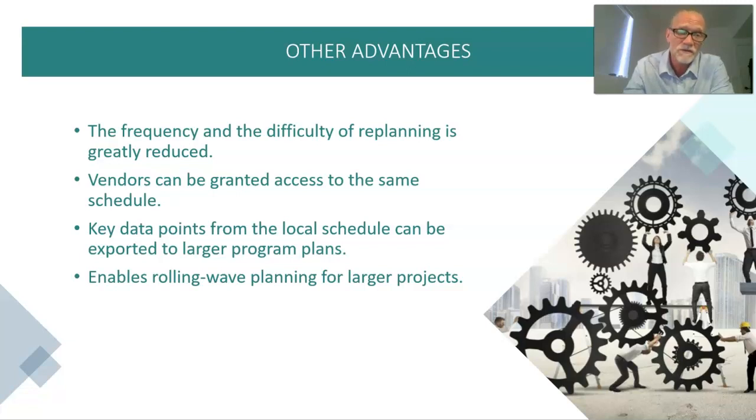Oftentimes in projects, we don't even know what's going to go in those future phases. So we can create the blocks. We have a good idea what the blocks are going to be, but what the dots are going to be, we really don't know. So we'll save inserting those dots for a later period, but the box dependency should be pretty clear.